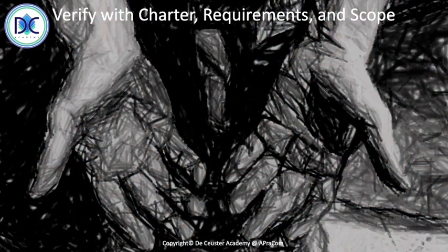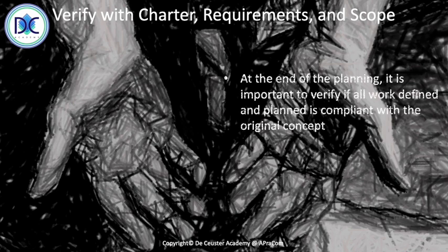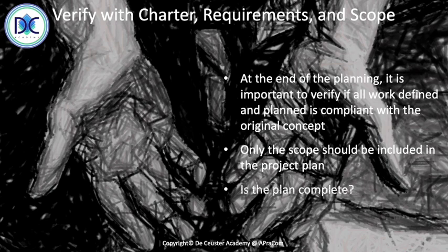Let's continue now. First of all, verify with the charter what the requirements are, what the scope is, and whether we comply with this. At the end of the planning, it is very important that we verify if all the work defined and planned is compliant with the original concept. We should only complete the scope. The entire scope should be included in the project plan. So it's a very important element to verify.